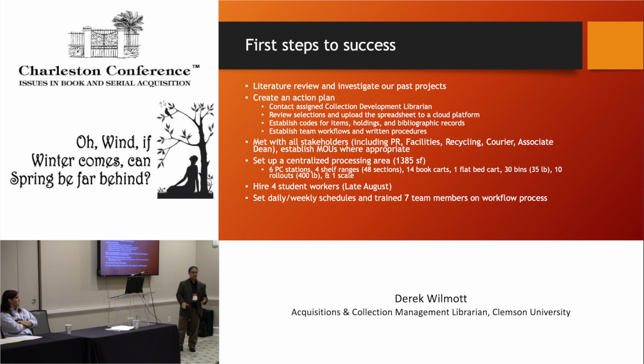We realized that that was too much. We filled it up to the top and had to make some minor adjustments along the way as well. I hired 4 students because there were only 4 of us working on it. I set up weekly and daily schedules and started training my people within the first 4 weeks of this whole process. So I had everything in place by early September: the recruitment, the training, everything. And we were moving rather rapidly on that process.